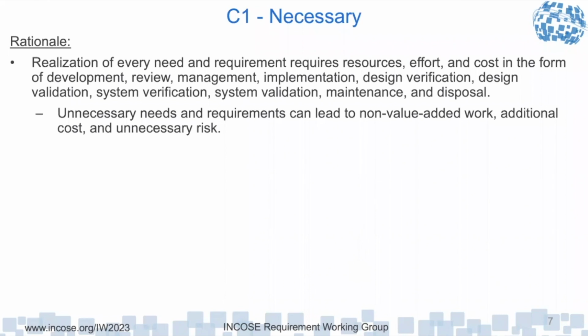As a requirements management tool, it's actually very strong in being able to support that. What we could do is keep what the original preferences were in terms of essential, highly desirable, and desirable, what each of the tenderers bid, and then what the contracted figure was, so that you can trace back later and say, look, the contract only did 104. Do we really care? Well, not really, because our essential requirement was 100. So we might be more gentle with that verification if the essential was only 100. It depends on how you want to go about managing the contract.